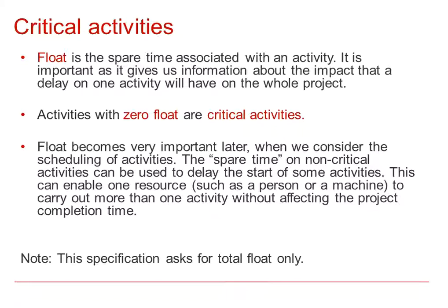Float becomes very important later on when we consider the scheduling of activities. The spare time on non-critical activities can be used to delay the start of some of the activities. This can enable one resource, such as a person or a machine, to carry out more than one activity without affecting the project completion time. Notice this specification only asks for the total float.